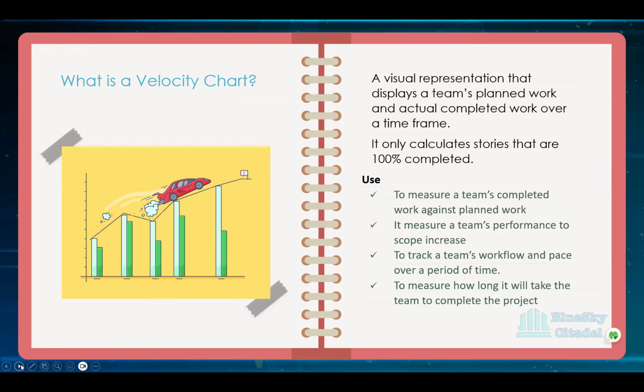And then it measures how long it will take also to complete a project. So with your velocity chart, a team can actually measure how long it's going to take them to complete the whole project, because they have a pace that they're using to measure that.